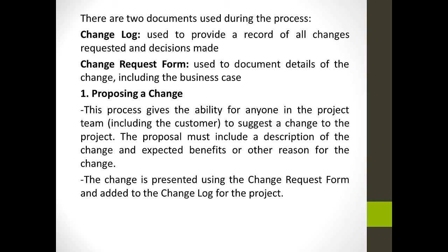The first step of the change control is proposing a change. This process gives the ability for anyone in the project or team, including the customer, to suggest a change to the project. The proposal must include a description of the change and expected benefits or other reason for the change. The change is presented using the change request form and added to the change log for the project.